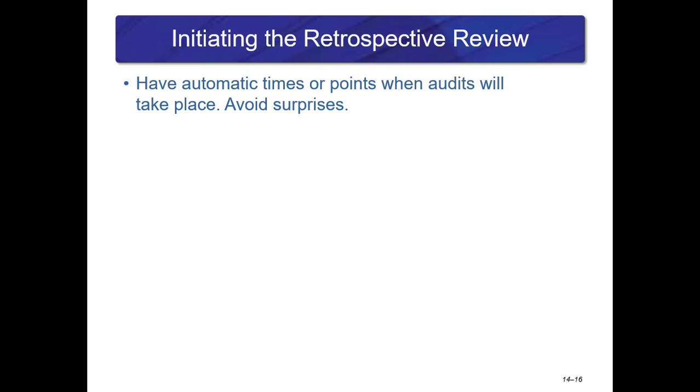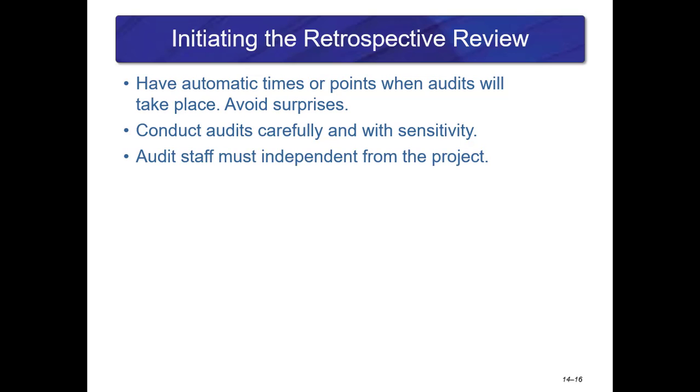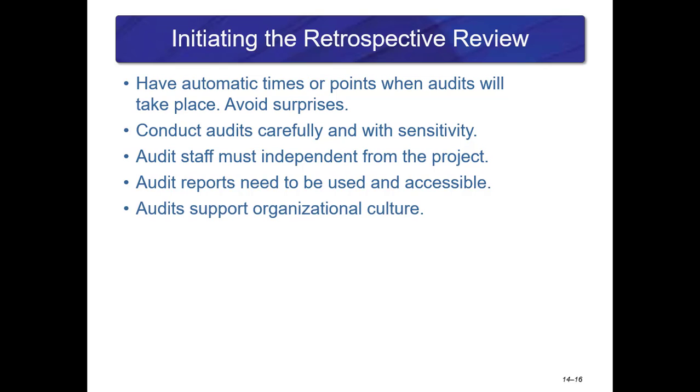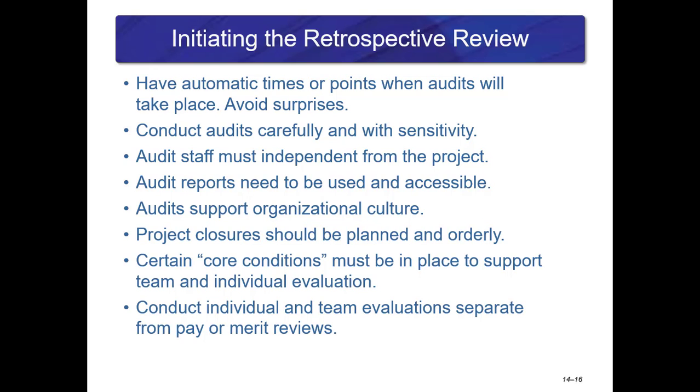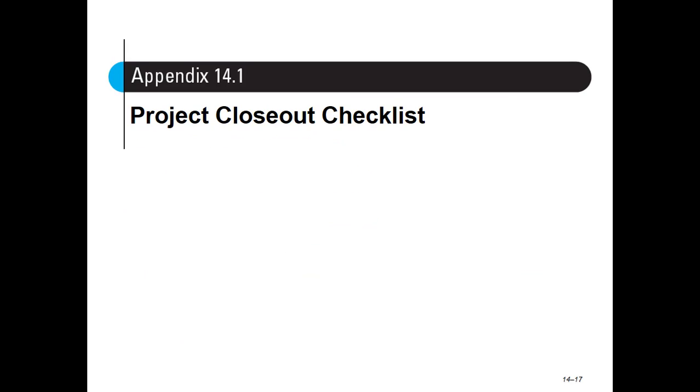Initiating the project retrospective review: having automatic times or points when the audits of the project will take place, avoiding surprises, making sure audit staff is independent from the project. Project closure should be planned and orderly, and individual assessments and evaluations should be conducted separately.